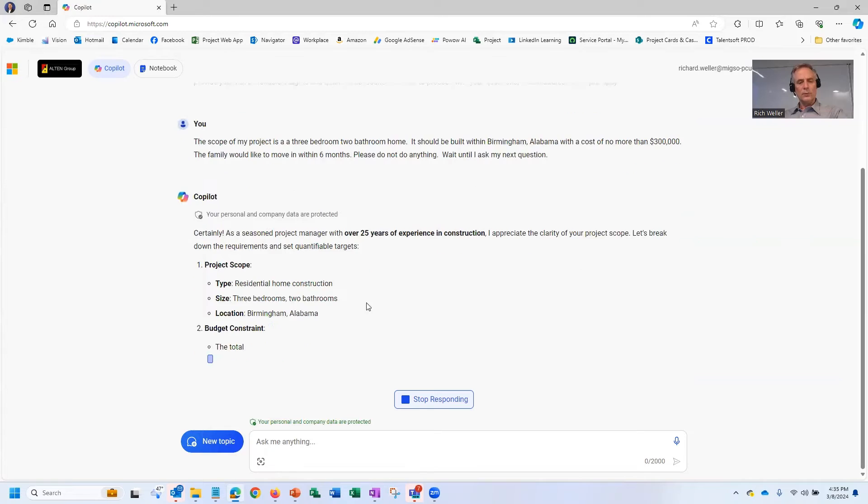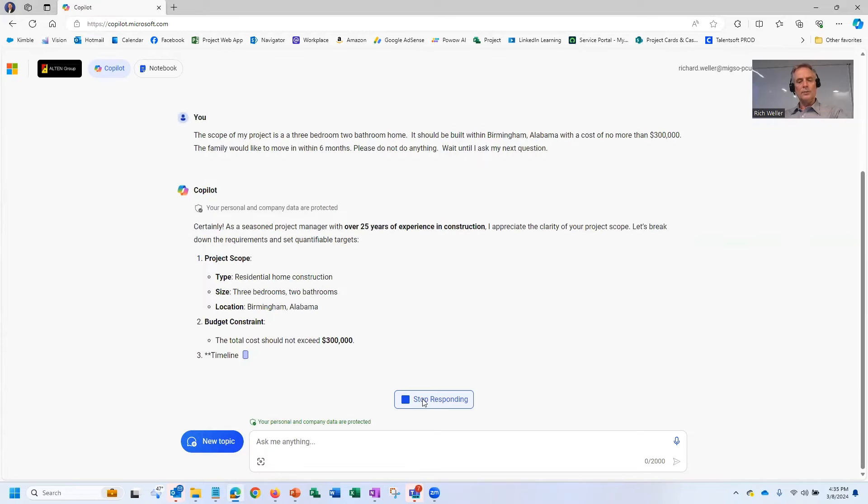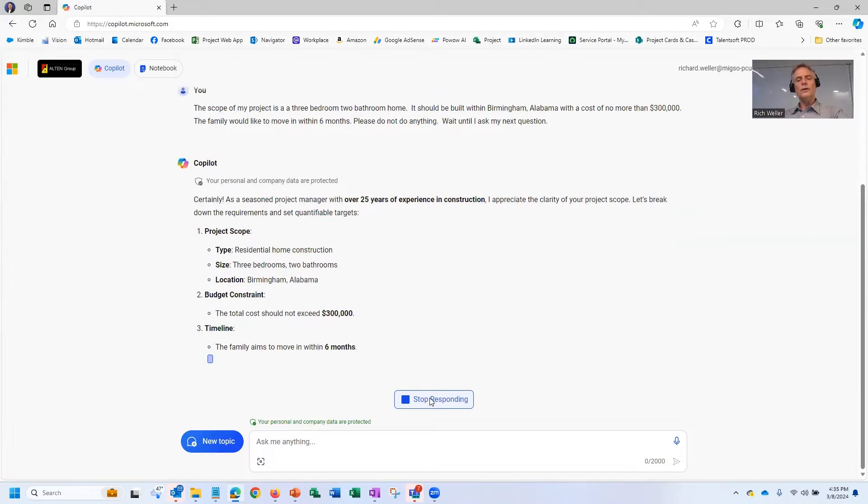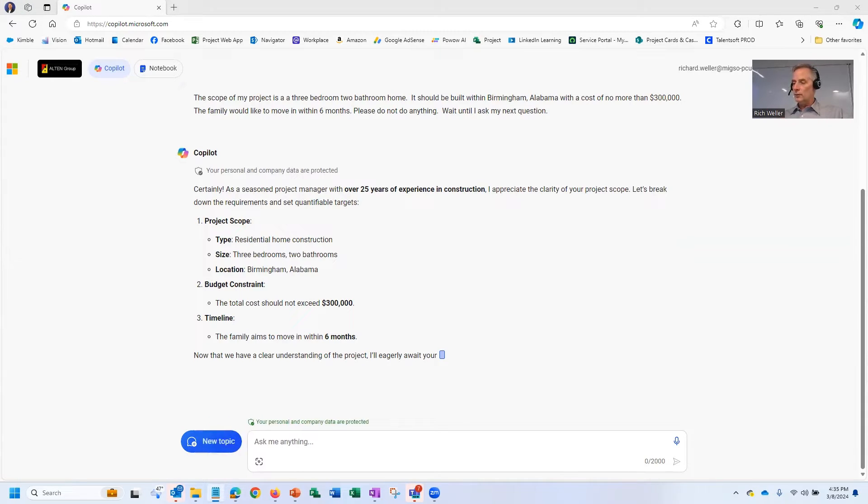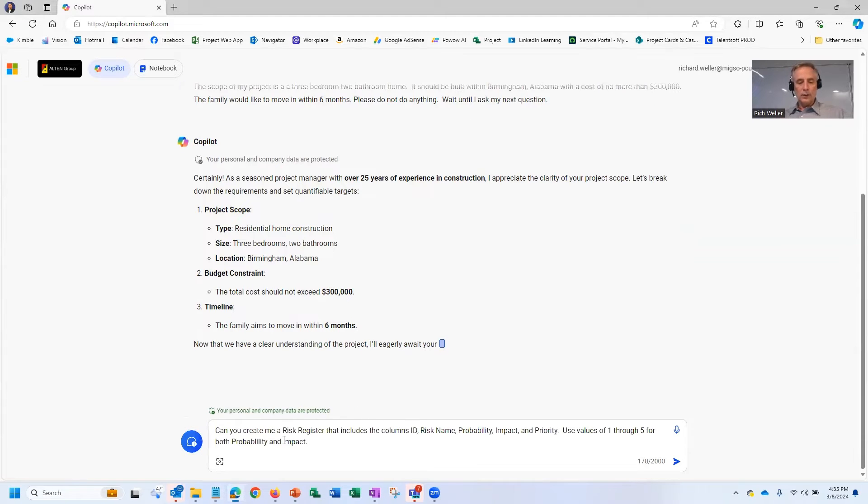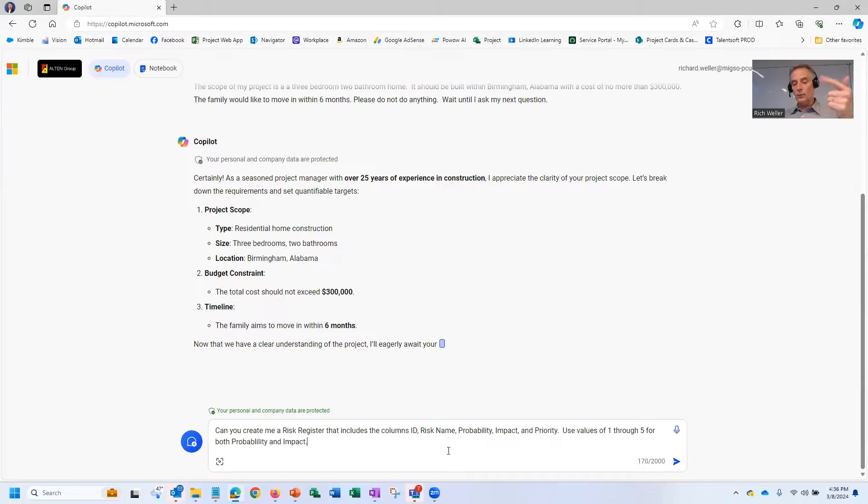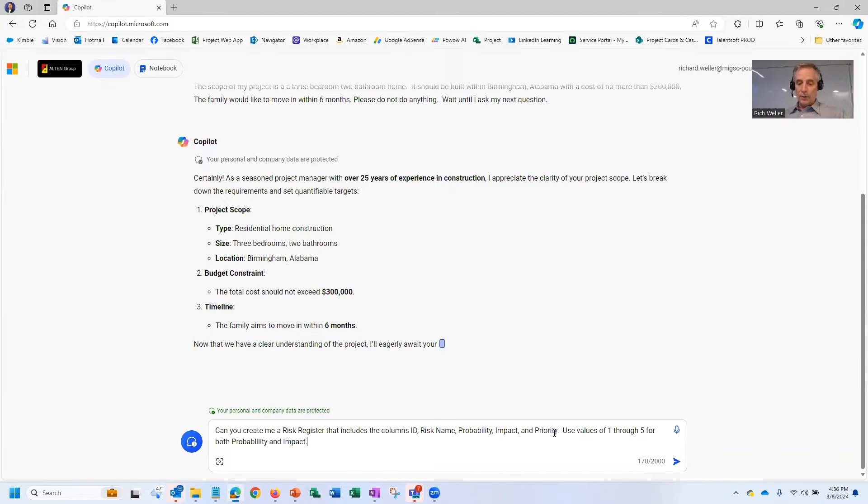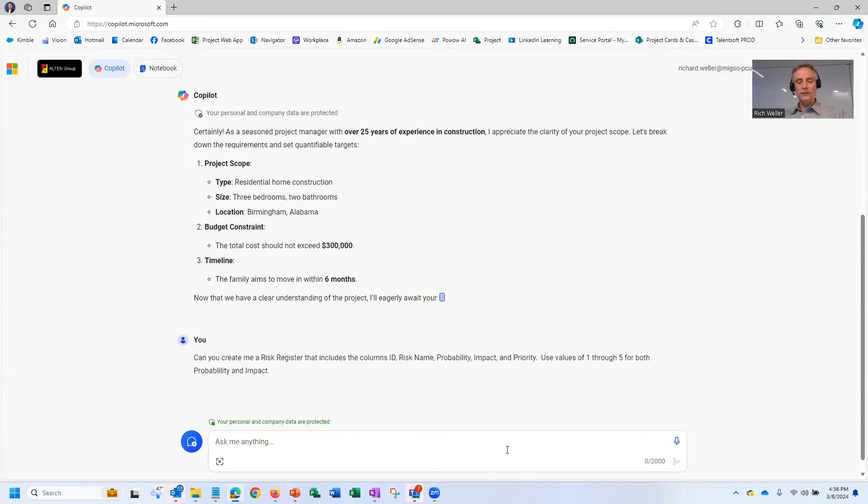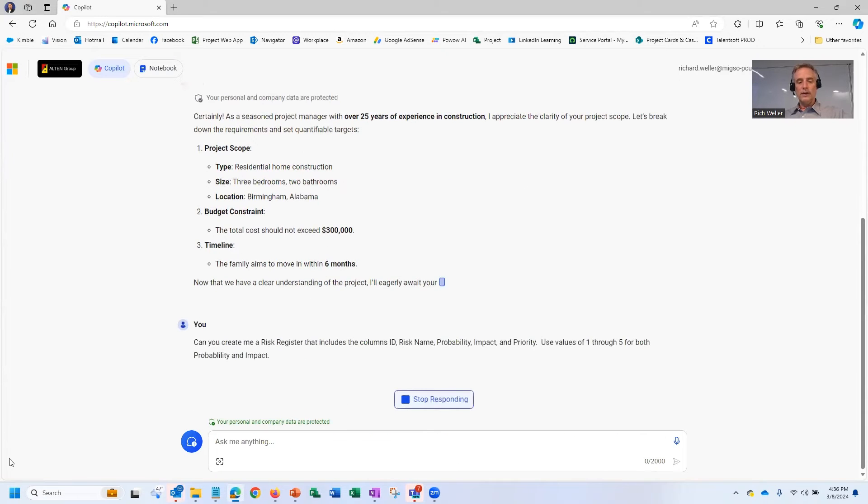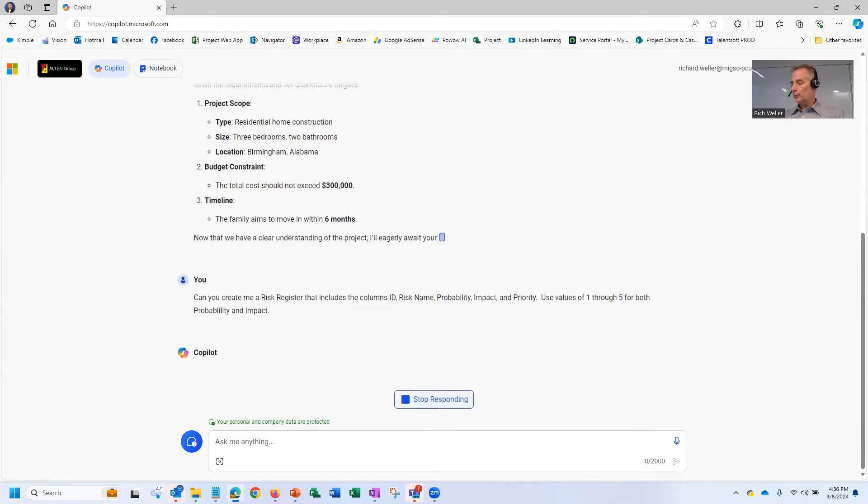But we don't need to hear all that right now. I'm going to stop my response because actually, Mr. Copilot, what I want you to do is, what I'm wondering if you can do is, can you create me a risk register that includes the columns for ID, risk name, probability, impact, and priority? And be sure to use the values of one through five for both the probability and impact. All right. All right, Copilot, see what you can do with that information.